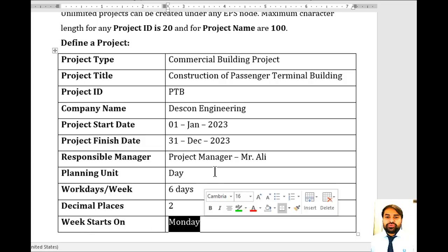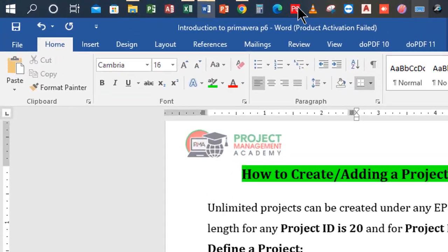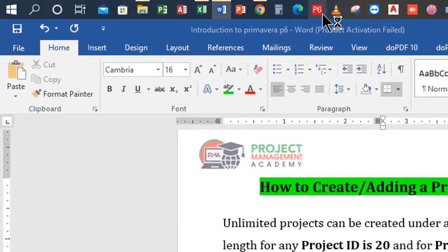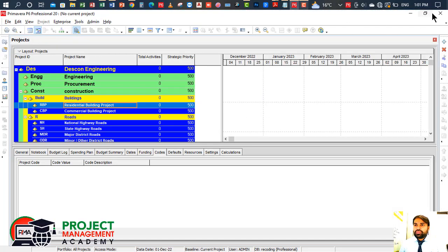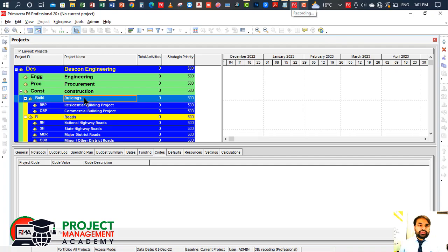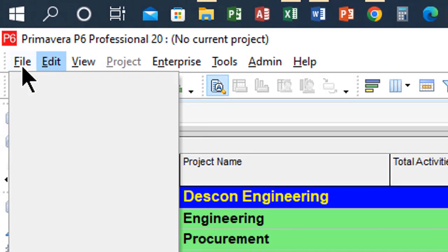Now let's jump to the Primavera P6 file and learn how to create a new project. Let me open the software. Now the software is open — go to File, then click on New.